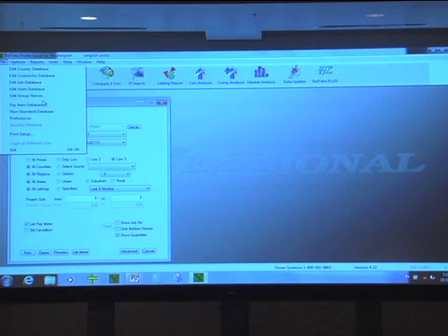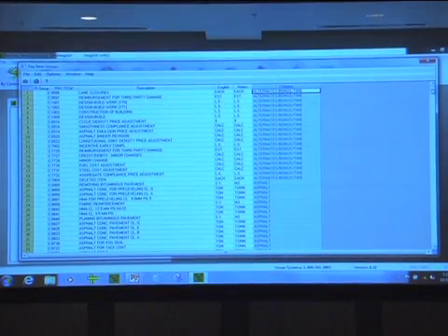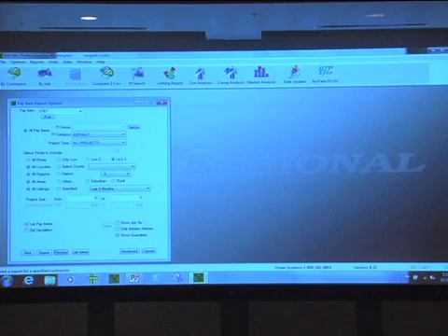How I do that is I go into my pay item database and sort again, and I get down to my asphalt items. I would take several items that are like items, that cost about the same, have the same installation type and the same unit of measure, and I can evaluate a group of them by just giving them the same number. So I've made a group, I go back out, and here I go back to my advanced tool.